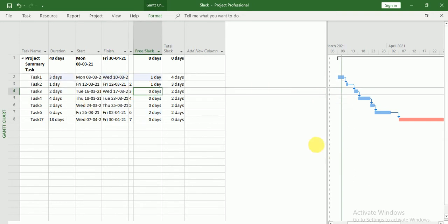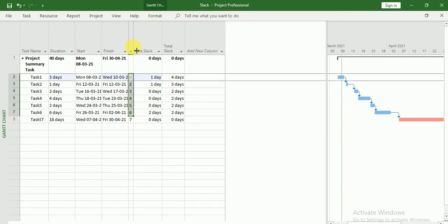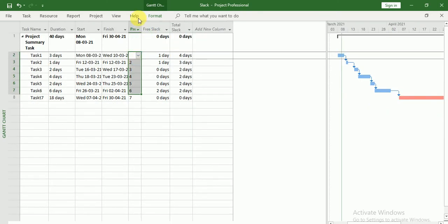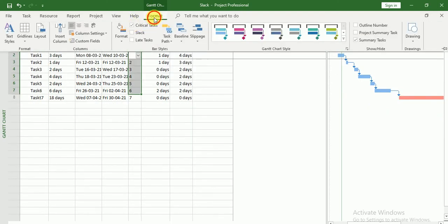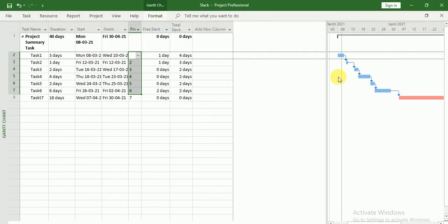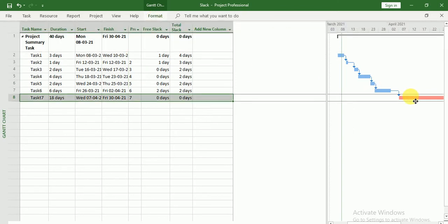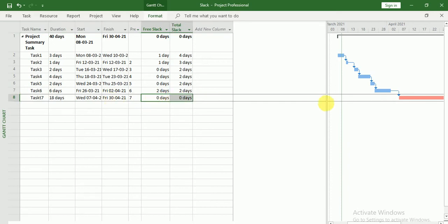So here you can see this is my project timeline and this is the dependency you can see. In the format I have just chosen critical task, and this is my critical task only. Why? Because we have Free Slack and Total Slack equals to zero — that's why this is a critical task.